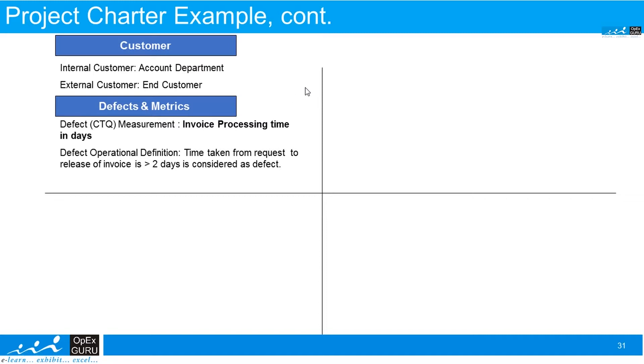From the request to release of the invoice, then it is considered as a defect. What is the baseline period that we have considered here? We have collected the data from January 15 to July 2016, and it shows that on average it is five days.